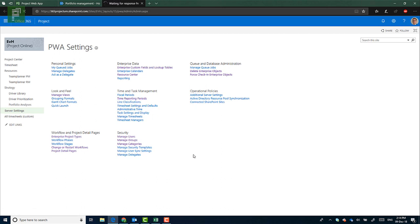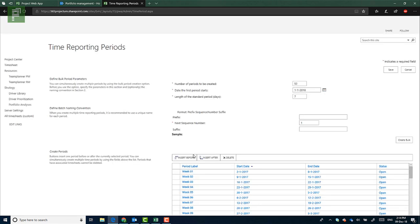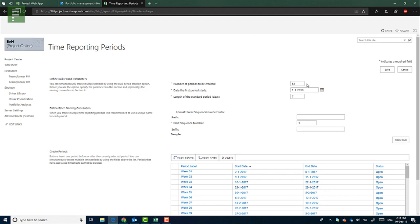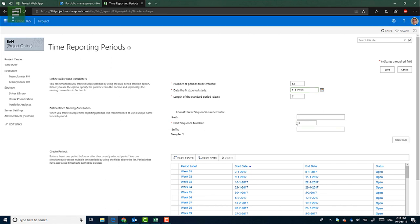Normally, right out of the box, Microsoft gives you the option to start time reporting periods from the start of the year, giving you 52 weeks or 52 instances of time. And that can be seen here. It also gives you a nice next sequence number, which is obviously one because we're starting.